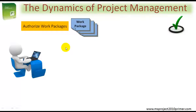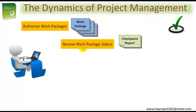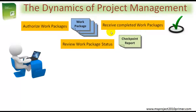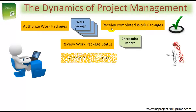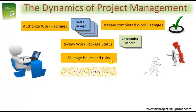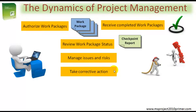During a stage, the project manager will give out work packages by authorizing them so that work can start, and this will occur on a regular basis throughout each stage. The project manager will then continually review work package status via the regular checkpoint reports from the team managers. When each work package is complete, in terms of the products being quality checked and approved, the project manager will want to acknowledge that each work package is complete. The project manager will also manage ongoing issues and risks, as well as take corrective action in an ad hoc manner throughout the stage.